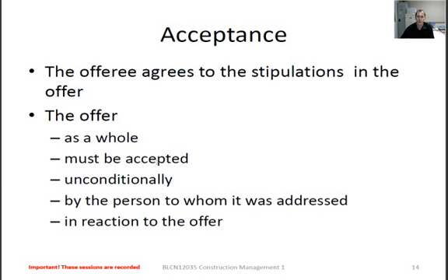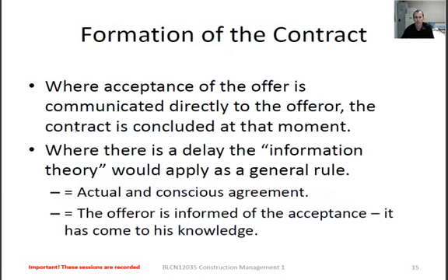All right, and if we look at the formation of the contract, when do these contracts come into life? Is it where the offer was made, or was it at the time that the agreement was reached between the two parties? The key here is the contract is concluded at that moment where the acceptance of the offer is communicated.